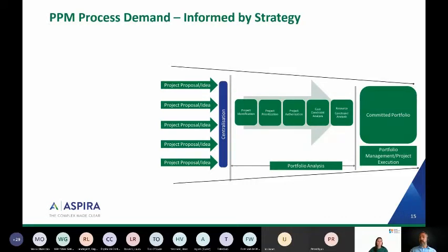Okay, so the project can now proceed, right? Not quite yet. The overall business funding to invest in the portfolio is going to be limited. The next step in the process should perform a cost analysis of the proposed portfolio of projects to determine which projects should be included in the portfolio. Okay, so we've done a cost constraint analysis to determine what projects can be included based on available funding. Can we now proceed with our projects? Not quite, we're nearly there.